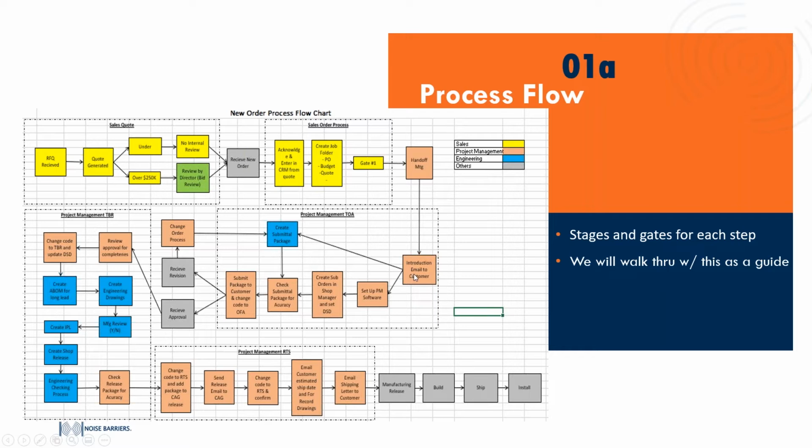I'm going through this quick so we can get through a lot of things. So if anybody has questions on this afterward, feel free to contact me. I could even share this chart with you one-on-one. Back to this. Here's the PM who receives the package, understands it, sends an acknowledgement to the customer. At the same time, we begin creating the submittal package. After this, what's typical is revise, repeat. We'll send a submittal package, which I'll show you. People will change the swings, the window requirements, and we go back and forth on resubmittals.